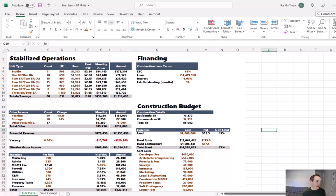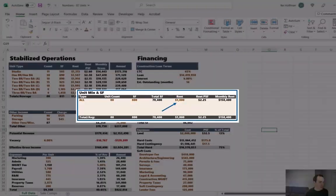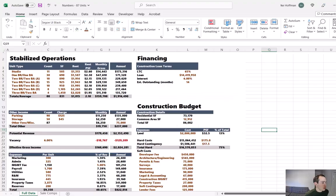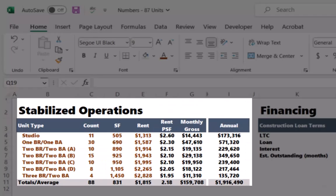On the left side, we have stabilized operations. Starting with the unit mix, in the first video we estimated 88 units at $1,800 rent. Now that we've flushed out the unit mix, we're going to see a little bit more revenue hitting the pro forma. Our average rent is $815. The average square footage is a little bit larger than we projected. However, the rent per square foot has fallen slightly from our original projections to $2.18 down from $2.25.